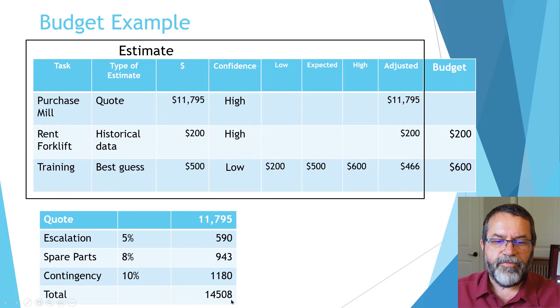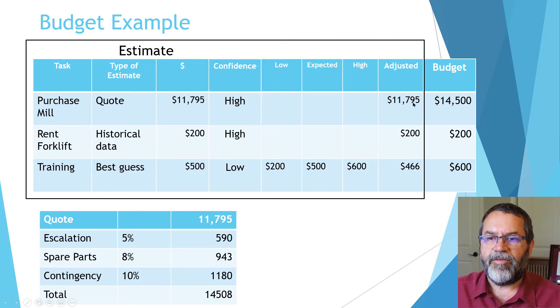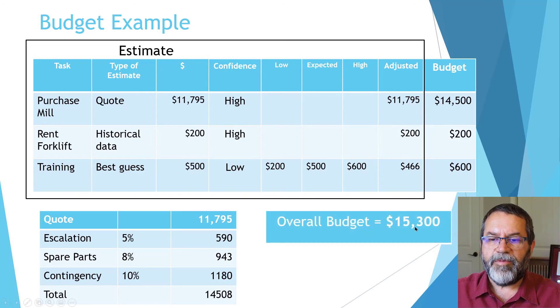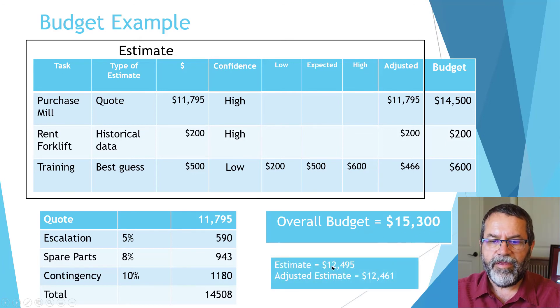Now I've got a total of $14,508, and I'm going to plug in $14,500—that's my budget amount. It's not my estimate. I estimated the cost at $11,795 for just the machine. Once I added escalation, spare parts, and contingency, I'm budgeting $14,500. My overall budget adds up to $15,300.